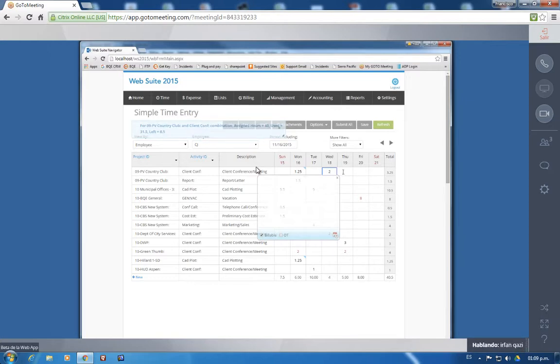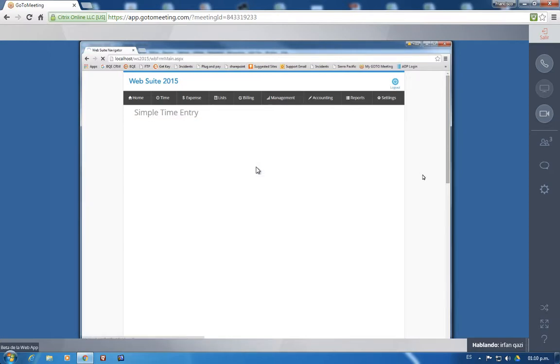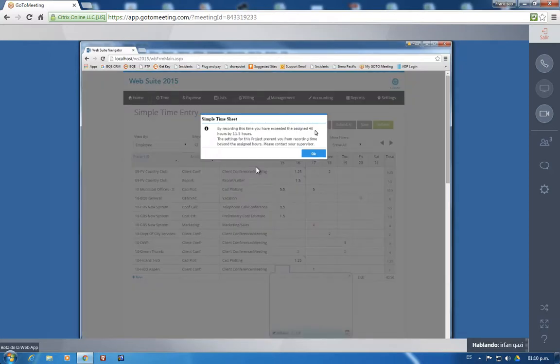Can I see up there to the employees for the activity? Yeah. If I go in here and put in now 20 hours for the same activity and try to save it, it will actually say you cannot put in more hours because you've been only assigned 40. You will be going over by 11.5 hours. A good control.